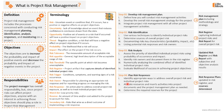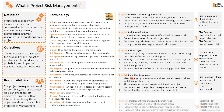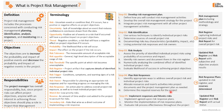After conducting risk analysis, we plan appropriate risk responses for the identified and analyzed risks. We identify ways to address overall project risk and individual project risks, allocate resources, and insert activities into project documents and the project management plan as needed. We also determine the required reserves for the project — a very important outcome of all risk management activities. The outcome of this step is having risk response plans documented in the risk register and the project reserves determined.